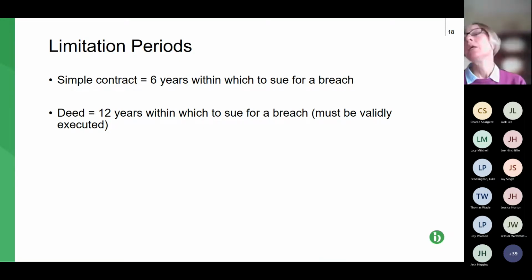And for example, you might have a deed, so it might be executed as a deed, but there might be a clause that says, notwithstanding that this document is executed as a deed, the contractor's liability for defects is 6 years, ending 6 years from the end of the defects period, something like that.